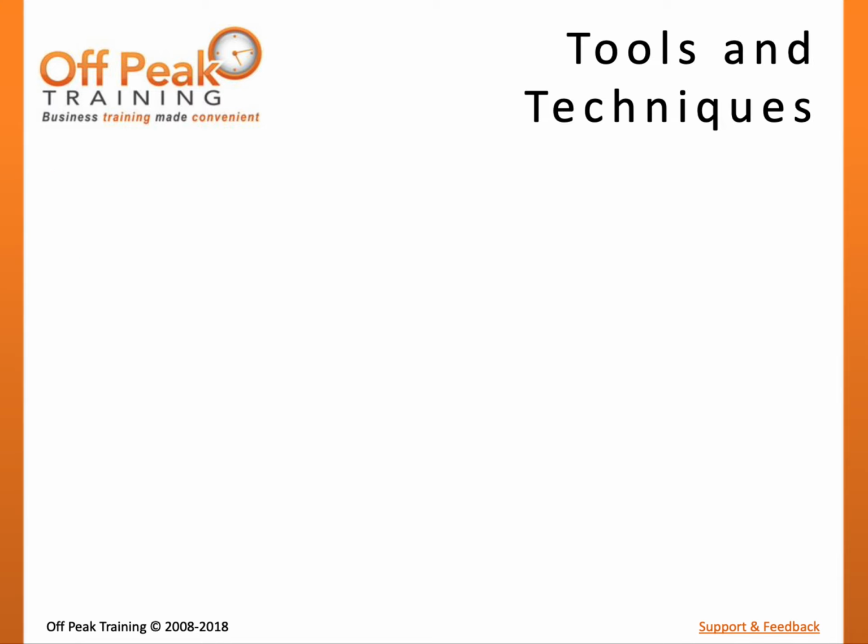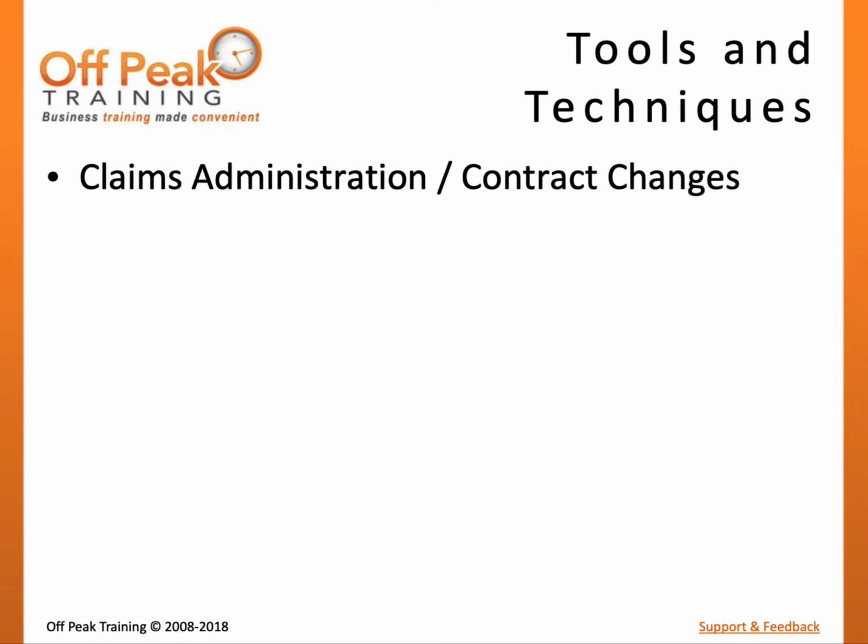The control procurements process includes many tools and techniques to help ensure that the buyer and seller are properly managing the terms and conditions of the agreements. In some instances, the buyer or seller may need to change the terms and conditions of an agreement. This may be due to a change in the project or seller performance. Since each agreement will have unique rules for how it may be modified, the parties must utilize the contract change control system. This is different from the project change control system, which governs project baselines.